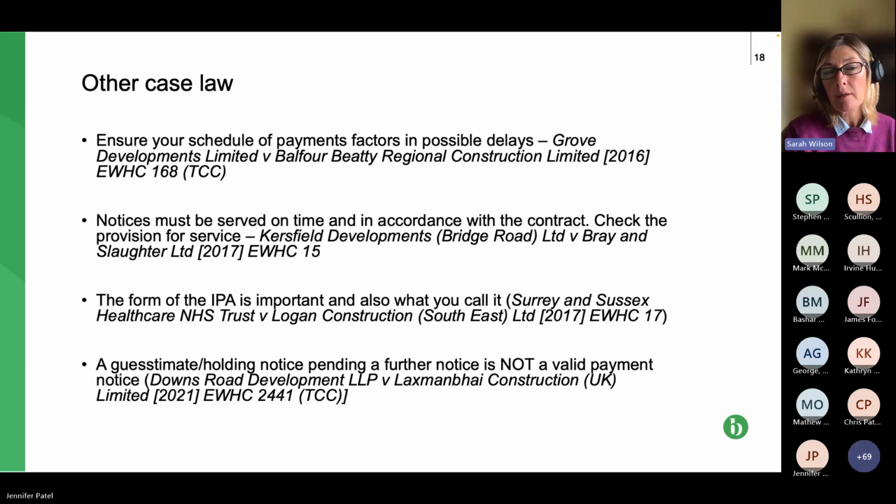The chances are the courts will say, no, it's not valid because it's not clear enough. The purpose of a notice is to be super clear as to what it is, so that the paying party isn't deceived into thinking, oh, this isn't the normal form of IPA, or it doesn't say it's an IPA, the others all previously have. Right, we don't need to respond to it. It's just not worth going there.